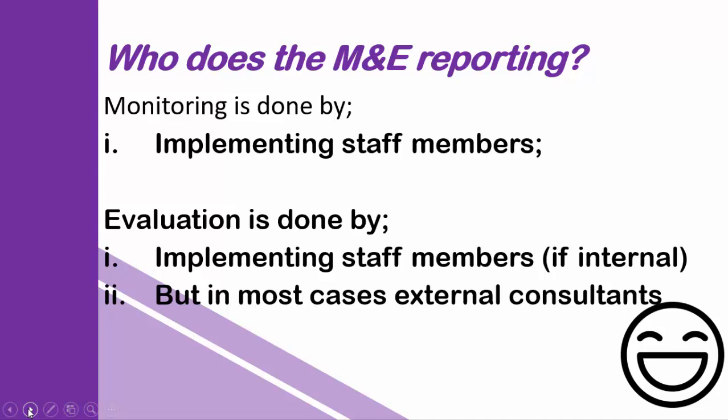I'm telling you the truth, there wouldn't be any learning, because the staff doing the evaluation are assessing activities they themselves have been implementing. So, in order to stimulate learning, this is not the right way to do it. It's only permissible for implementing staff to do an internal evaluation if those findings are going to feed into the external evaluation.